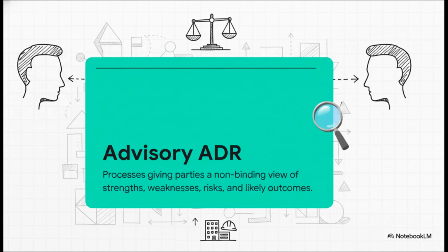This is the exact scenario where Dr. Rao recommends advisory ADR. This includes processes like a mini trial or a senior executive appraisal. In this forum, advocates present their case in a really condensed way to a panel made up of a neutral third party and senior management from both sides.